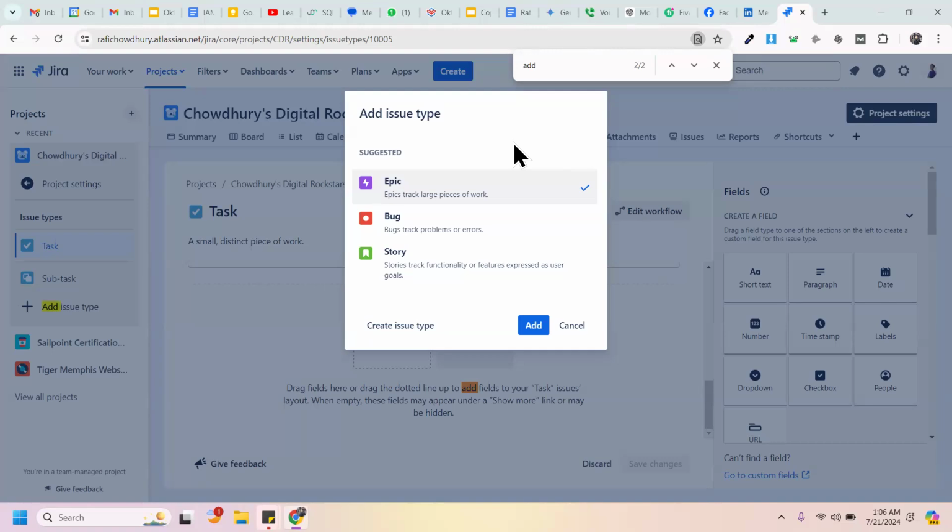Say, as an example, it's a requirement. So it's a shoe design, right? Now shoe design is one of the stories. When you break that down, you can have subtasks like building a wireframe. With a tool, someone would take 2 hours to build that wireframe. After that wireframe is built, someone would do the UI and UX on it.